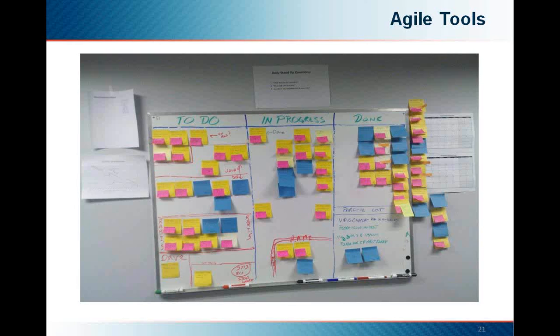The center photo is the Kanban board. On it you will see various post-it notes that represent a development task. Sometimes these are individual requirements or user stories in Agile terms. Here they're actually individual tasks that were divided and estimated by the team before the sprint began. Sprint, as I said before, is an Agile term that addresses the individual iterations. Many sprints make up a software release.